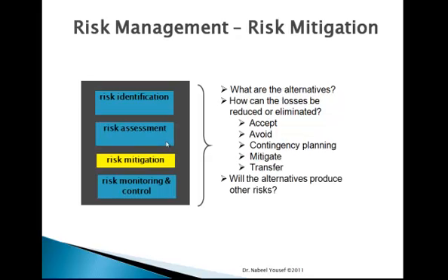Then when looking at the mitigation, we look at the alternatives. How can the losses be reduced or eliminated, whether to accept, avoid, contingency planning, mitigate, or transfer. And then, will any of the alternatives produce other risks?